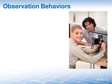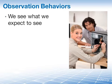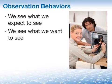The observation technique has both positive and negative consequences. First, we see what we expect to see — human observations are biased toward the observer's conscious and unconscious expectations. Any observer bias can cause us to overlook relevant requirements. Second, we see what we want to see, introducing more observer bias. This usually happens in good faith and is not deliberate falsification. The main defense, besides using correct observation techniques, is peer review and repetition or observation by others who have no bias.